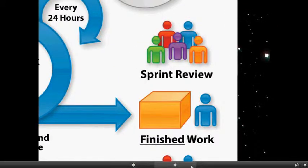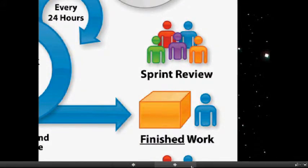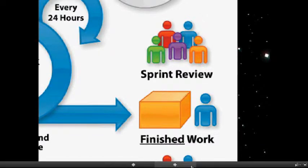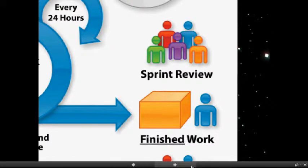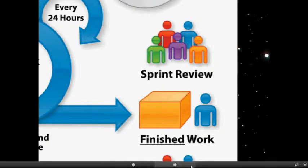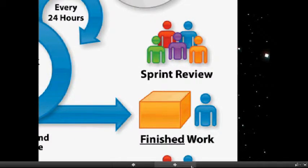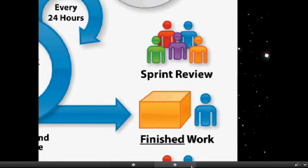After each Sprint, a Sprint Review meeting and a Sprint Retrospective meeting are held. The Sprint Review meeting is held with the client. This meeting is held to improve the product, show accomplishments, and get firsthand feedback from the client. The Sprint Retrospective meeting focuses on improving teams and encouraging them to make improvements in every sprint.